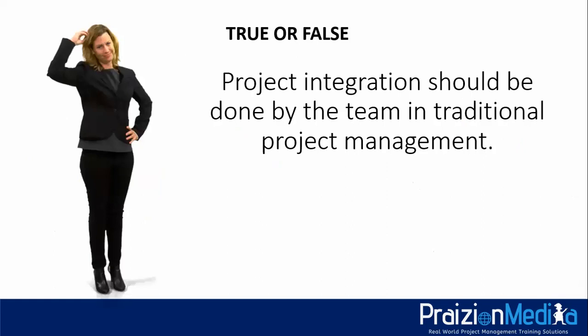True or false? Project integration should be done by the team in traditional project management. 3, 2, 1. The answer to this is false. It is not done by the team. It is done by the project manager. This is not true. In the world of Agile, however, project integration management is done by the team.